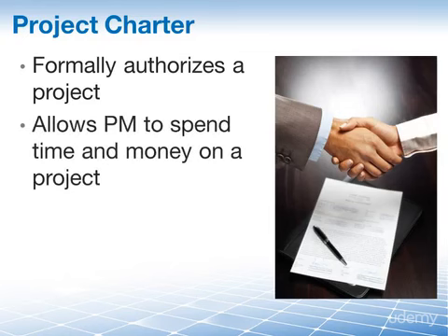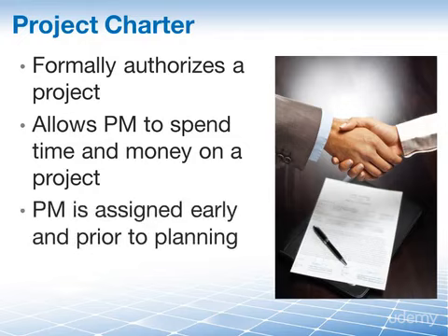In other words, you as the project manager, your name is in the charter, you're named in the charter, and based on this, you are now allowed to spend time and money on this project and probably even hire other people for it. Also important to know is the fact that the project manager should be assigned prior to the start of planning, and preferably as you are actually creating this charter.